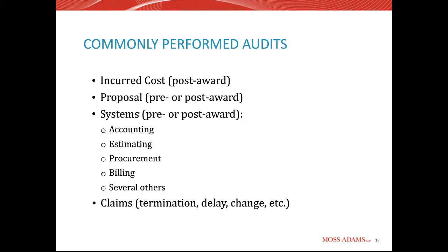On the proposal audit side of the work, and particularly the post-award audit, there can be pretty serious ramifications for noncompliance in this area. Often there's a certificate of current, accurate, and complete cost and pricing data that's signed by the offeror, which basically means that you've provided all the information that would affect that contract price, all the information that you knew about, but also the information that you should have known about at the time of the handshake, an agreement upon price.